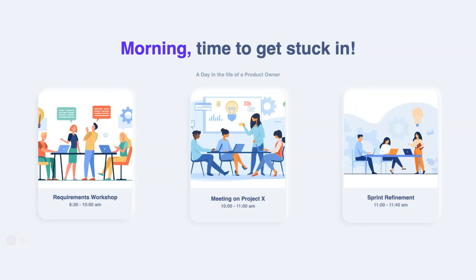Coming from that, I've got sprint refinement, 11 to 11:45, so a bit shorter than the normal I would use for refinement. But we're going to go through with the Scrum team and refine tickets for future sprints. So for this one, we're going to look at the next sprint. We're about halfway through this sprint and we want to make sure we've got enough tickets ready for sprint planning in about a week's time.